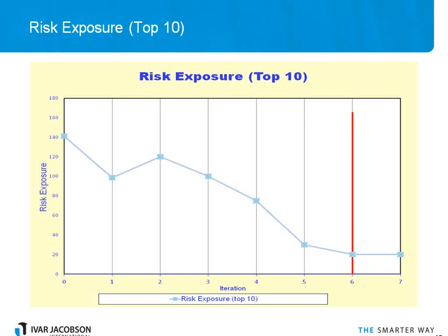The other problem as you go through is you start with 10, but each iteration you're going to uncover more risks or add more things to the risk list. And when the risk list gets really long, you'll find that most of those risks, you've reduced the impact, you've reduced the probability, but they haven't gone away. So having lots of those little risks counted all the time, particularly the ones that weren't on your list at the beginning, can distort the numbers and make the graph look like possibly even going the wrong way. If you just focus on the top 10, then you will get the nice curves, you'll get the drop down, because we're looking at our risk exposure.